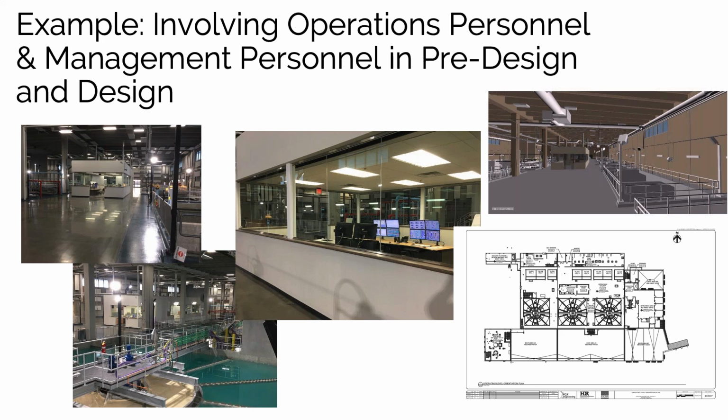So instead of having the problem occur after the building's already built and you find this out, it occurred much earlier in the process, and they designed a door on the upstairs where you could take a forklift and get the equipment out that way. Had they waited until the building was actually built and had to put the door there, it would have been way, way, way more expensive than doing it up front.